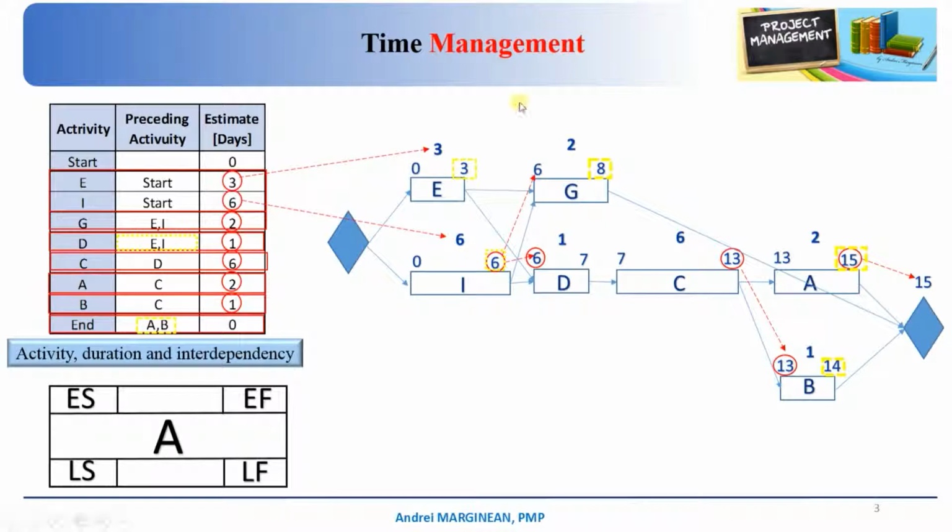A very nice trick of building this is making the boxing proportionally with the length of the estimated days. So as you can see here, because this is the longest path, we don't have to validate these things. We know that this is the last one. If you look here at the G, we see that this can't be the ending of the project because it still takes this distance here. Okay, let's go to the other part.